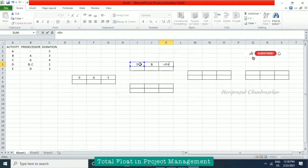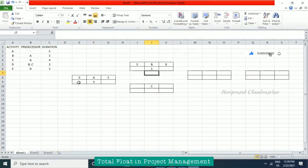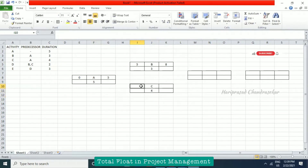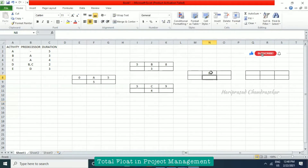From A we also have activity C. C has a duration of four, so it starts at five and ends at nine — five plus four. Then we have activity D, which has both B and C as predecessors, so D comes from both B and C. D has a duration of two.